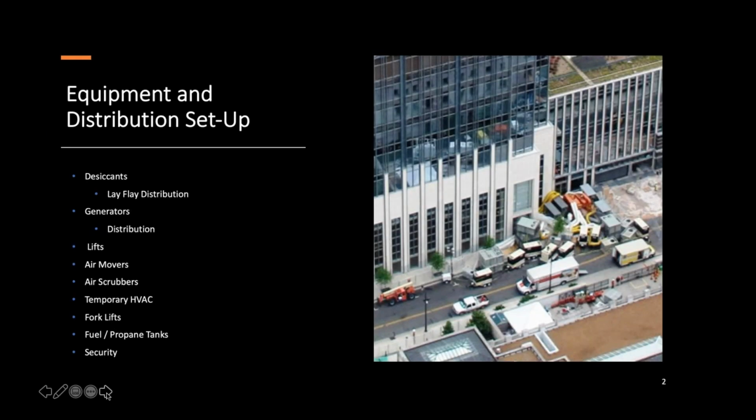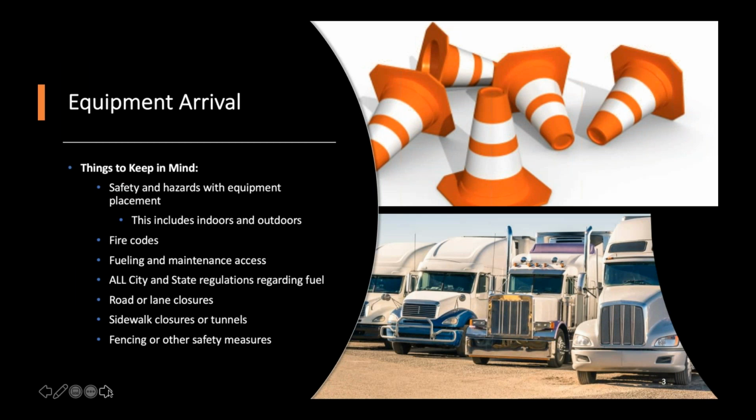As you're looking at this picture on the screen now, how would the fire truck get in there? How would you get a fire truck through that street? Pretty much we've got the entire street blocked at this point. So remember, a lot of this equipment is coming in on large trucks, whether it's your forklift delivery, and they've got to know where to unload. And you've got to make sure that you make room for these big trucks to get in.